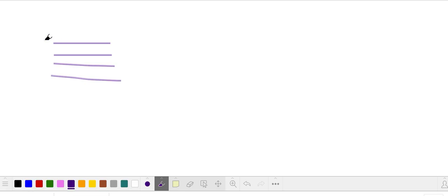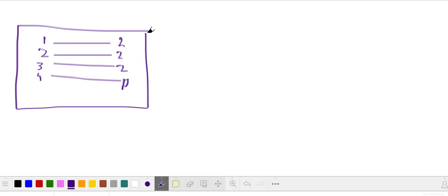So what is basically a schedule? The way I always recommend everyone to remember this: we define activities, and then we are sequencing these activities, then we are estimating these activities, and then we are developing this schedule into software, which is PMIS software.